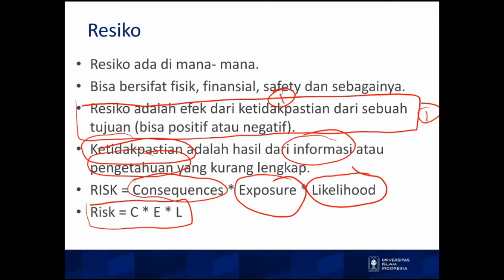Means that if the degree of one of the variables there is higher, it leads to a higher risk. In the same sense, if we want to reduce the risk, we can do it by reducing the likelihood or reducing the consequences.